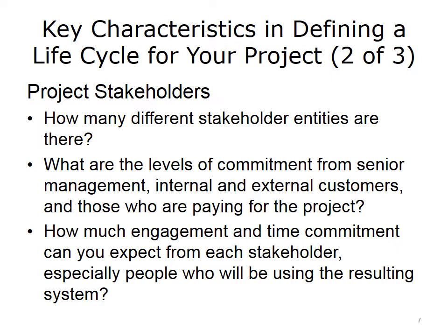Stakeholder identification is key. In a healthcare IT project, you need to identify everyone who might have a part of that system. You will need to gather together people from all strata of the workforce, from the greeters at the front desk of the hospital all the way up to the administrators at the highest levels. Their amount of engagement will also be key.